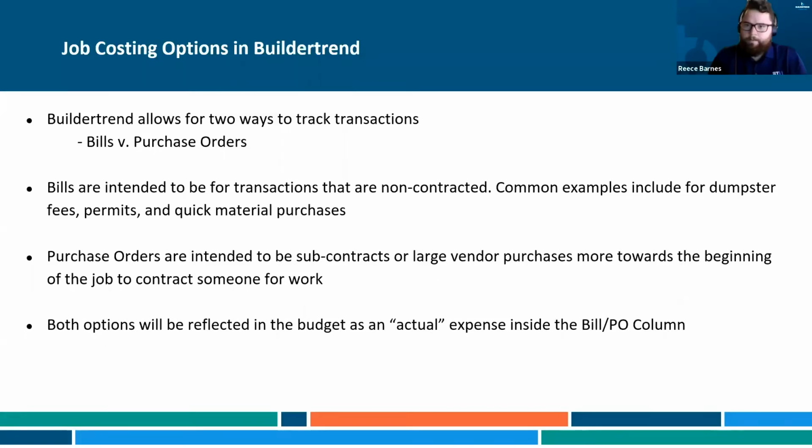And you get a contract that you can sign off on. And as soon as you apply the signature, guess what? The purchase order is a legally binding contract. You've locked into that contract. Now, could you send a PO in Buildertrend to a vendor? Sure, no problem, and that's pretty common. But what you gain by using the POs is the ability to hold someone to pricing a lot more effectively.